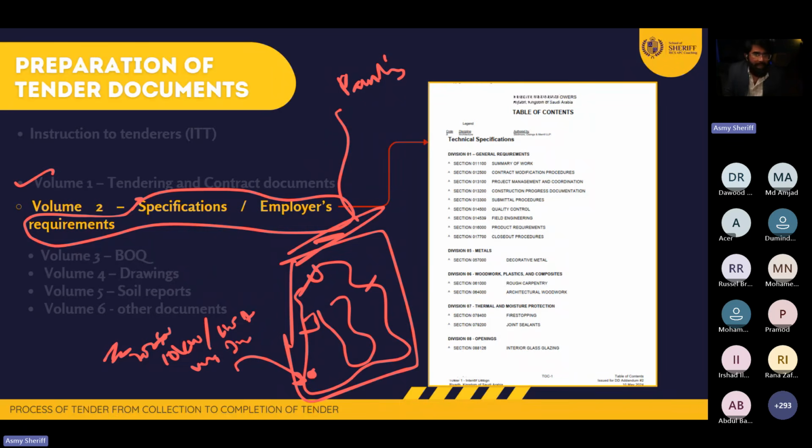So remember that in my drawing, I just mentioned a motor. I'm giving more detailed information about the motor in another document. So in your opinion, which document do you think should be very important? In the drawing, I just highlight there is a motor. In the specification, I'm telling that the motor should be 10 kilowatt or maybe 100 ampere, manufactured in Germany, and should have ABC XYZ requirements.